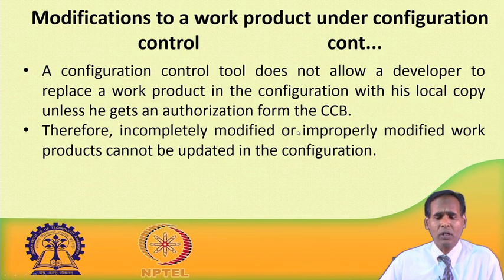A configuration tool does not allow a developer to replace a work product in the configuration with his local copy unless he gets an authorization from the CCB. So, unless the CCB approves the changes, even if the software developer has got the private copy, he cannot upload it, he cannot restore this modified copy.